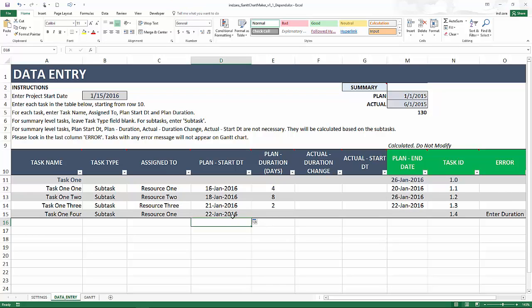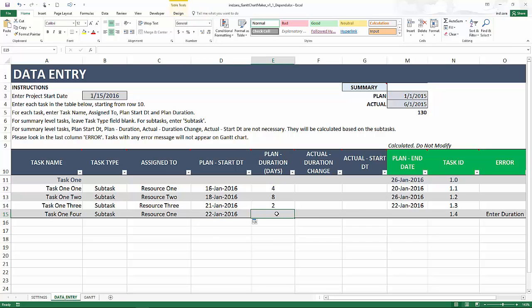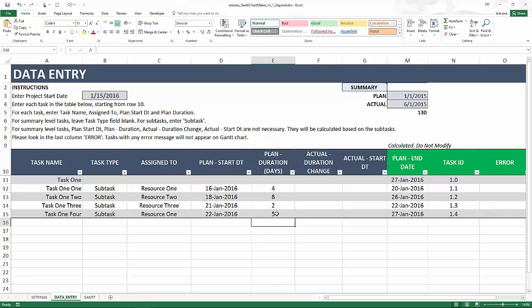What I have done now is I've made this to be a formula-based start date which depends on the end date of the two other tasks. Let's say I put in 5 as my plan duration. Immediately the plan end date gets calculated.